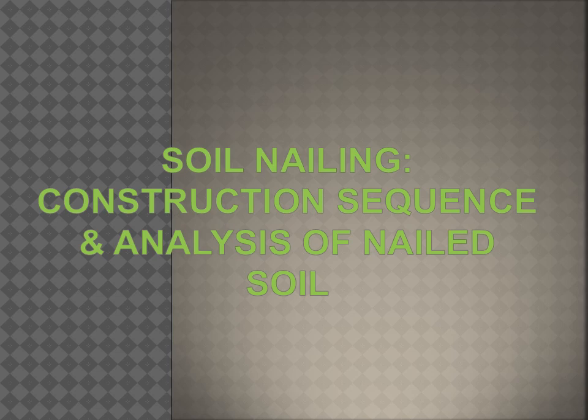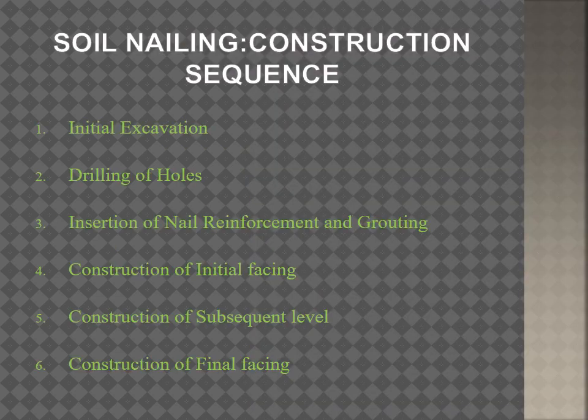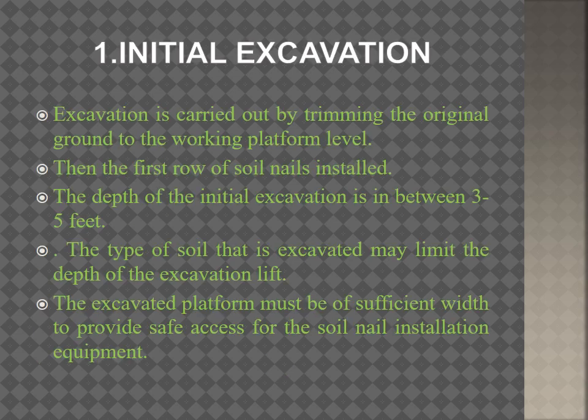The construction sequence of soil nailing is a six-step process. The steps are: first, initial excavation; second, drilling of holes; third, insertion of nail, reinforcement, and grouting; fourth, construction of initial facing; fifth, construction of subsequent levels; and sixth, construction of final facing.